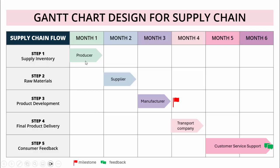You can see that supply inventory — meaning the producer has to supply — is in the very first month, and only then can we proceed with the other things, which are raw materials and product development, which comes under month three. I have added a milestone here, and then step four is the transport company, and then for two months we get the customer feedback.